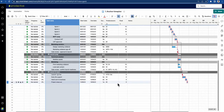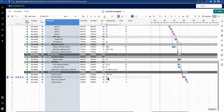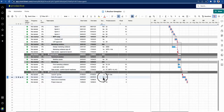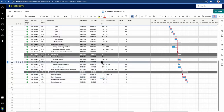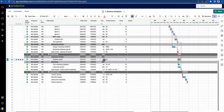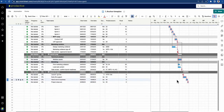Scrolling down to the bottom, you can see 'early life support' is currently on the critical path. If we go to 'mobilize assets' — that's four weeks and it's on the critical path. If that's pushed out, you're going to see that the launch go-live is pushed out as well. Let's turn four weeks into five weeks and you can see the whole thing pushes out.